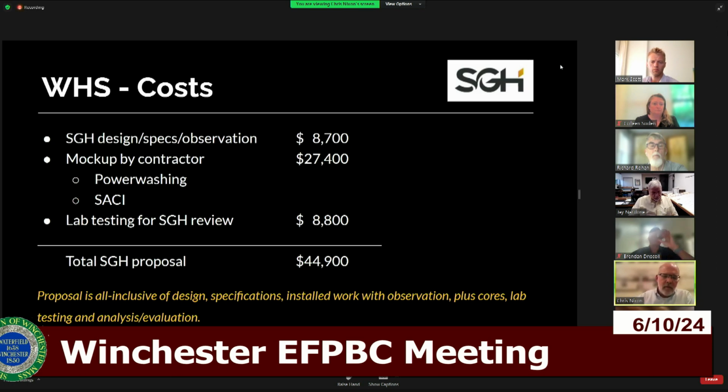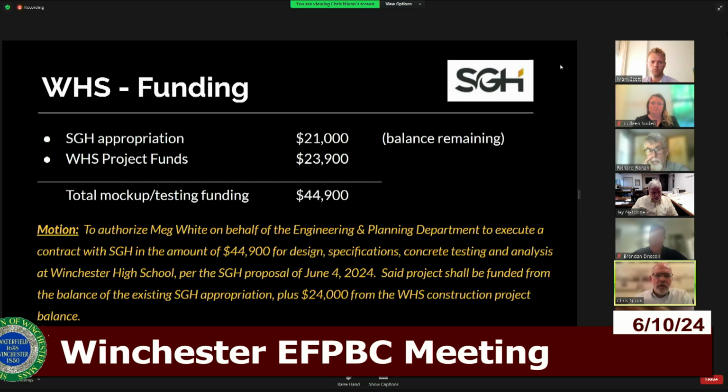If we have interest in moving forward on this, in terms of where the money will come from, Meg confirmed for us this week, we have about $21,000 left in the existing SGH appropriation. She had conversations with management and with our comptroller last week. They feel that the nature of this work makes it eligible for us to pay for it with some of our existing Winchester High School construction project funds.